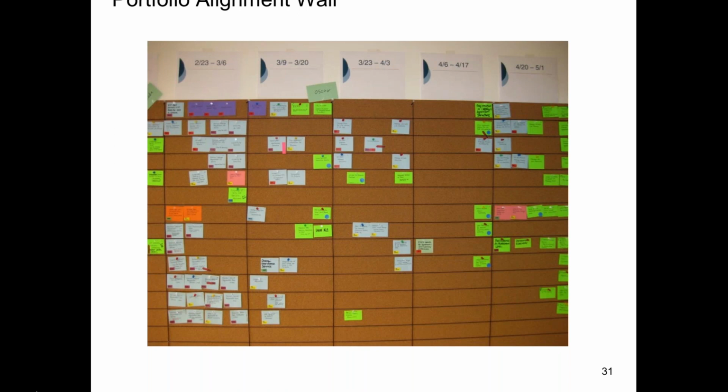And that is actually sometimes referred to as dual track Agile. Rather than a big batch getting thrown over the wall, teams are working hand in hand to discover and deliver value quickly. The beautiful thing is the user experience folks might say, could we run a quick A/B test on these two different ways of developing the interface? The development team quickly implements it and is involved in the measurement, figuring out user behavior, which helps inform which way we finally want to go.